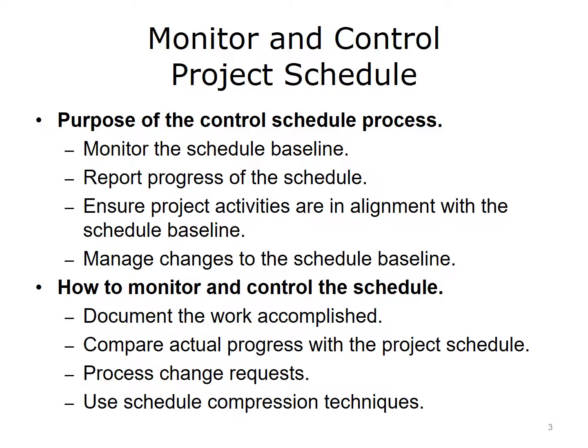If variances are detected and considered significant, you have to decide which corrective or preventive actions to take. Corrective actions may include bringing in more resources, also known as crashing, and doing more work in parallel, which is usually referred to as fast tracking. These techniques may increase project costs and project risks. Preventive actions are recommended changes to the system or process that will prevent future schedule variances.